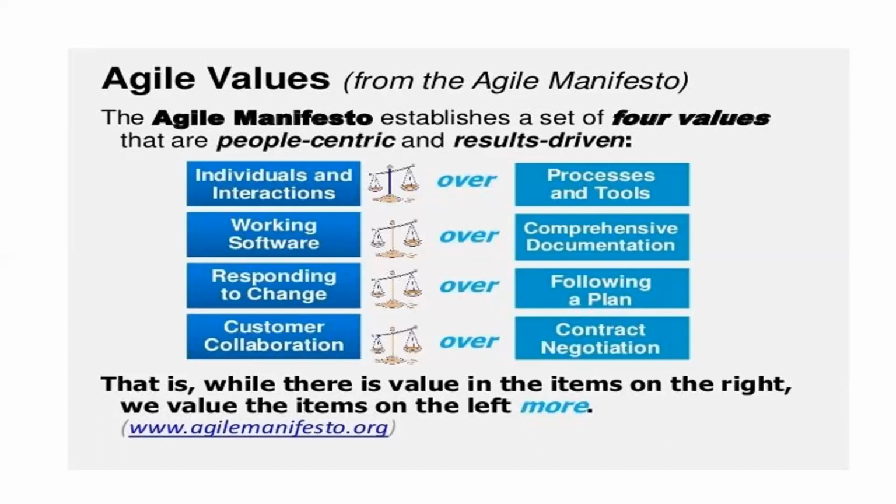But in Waterfall, for every change, you have to write a change report form and submit it to the change control board. A meeting has to be booked, and even approval by the board depends on the amount of changes. So that process slows things down. That's why you have to be open to change anytime instead of following the plan.